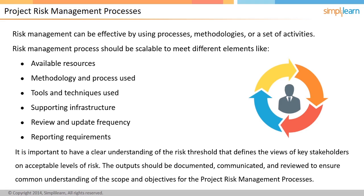It is equally important to identify the framework to manage the risk, starting from the initiation stage to its successful implementation. Project risk management activities, resources, and attention should be appropriated to the project. Since different projects warrant different levels of risk management application, some of the actions required for tailoring are: defining objectives against which risks will be identified; defining how elements like resources, methodologies, tools, infrastructure, and communication are scalable for the project; and defining risk thresholds, tolerances, and the assessment framework. The outputs should be documented, communicated, and reviewed to ensure a common understanding of the scope and objectives for the project risk management processes.